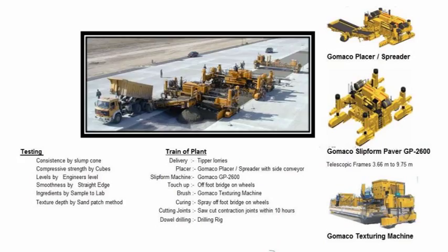Finally the top surface is brushed to provide a texture. Curing agent is sprayed to the top and side surfaces. Concrete strips of slabs, also known as lanes, were paved to a hit and miss lane pattern. The hit lanes, also known as pilot lanes, were slip formed first with the infill lanes completed later, after a minimum of 14 days to avoid damaging the pilot lane concrete.